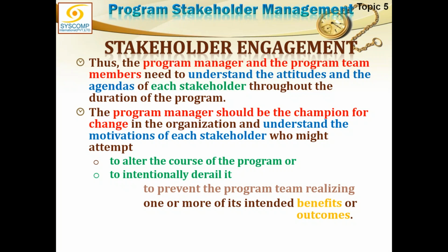And as soon as we developed our initial plan, one fine morning, the resident engineer arrived, and he changed the whole plan, and he said that this all will be included. Without taking any approval, without raising any change request, because that guy is a senior guy, he thinks he has the authority to change everything, which is not correct. The program manager should be the champion, and he would be in control of all such stakeholders who get involved with us.